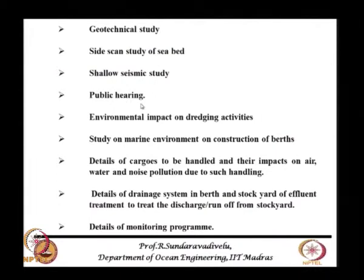Public hearing is a mandatory requirement. This is done by a district collector, where all the people go and the developer makes a presentation. It is videographed and kept as documentation. It is done for major projects — whether it is an atomic power plant, thermal power plant, or port facility — for anything we do this public hearing.